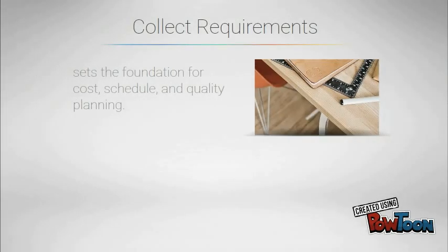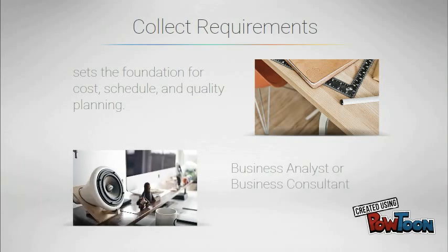Vague requirements are a common reason for project failure. Therefore, it is critical for you to implement the collect requirements process accurately. The output of this process sets the foundation for cost, schedule, and quality planning. Since this is one of the most crucial processes in many organizations, the role of collecting requirements is called business analyst or business consultant. It is a highly specialized role.